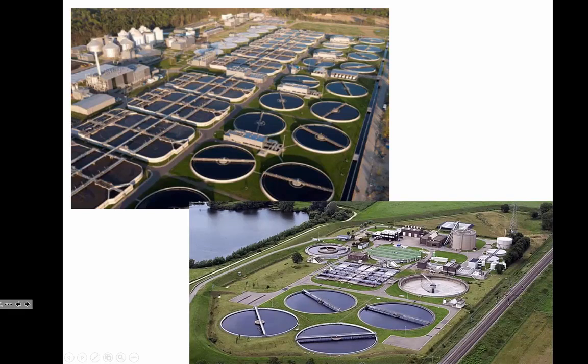Now, here's a much smaller treatment plant. They've only got 4 clarifiers in this treatment plant. So the first thing we're going to look at today with cost-capacity relationships is, let's say that you had really detailed financial data for how much it costs to construct this bigger treatment plant. Maybe it would be possible, if you had another project down the line, to estimate in advance what the costs are going to be for the smaller wastewater treatment plant based on what you know for the larger one.